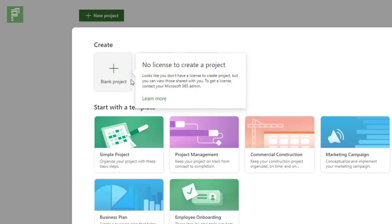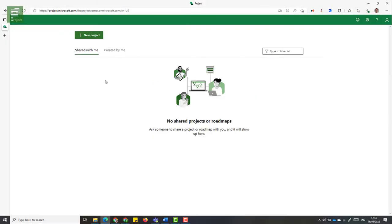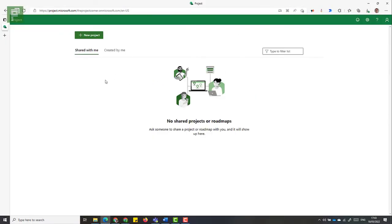Even though a resource might have project plan one, plan three or plan five, even licenses on their own tenant. Microsoft needs you to have a license within the current tenant that you're accessing. And I don't have anything shared with me.